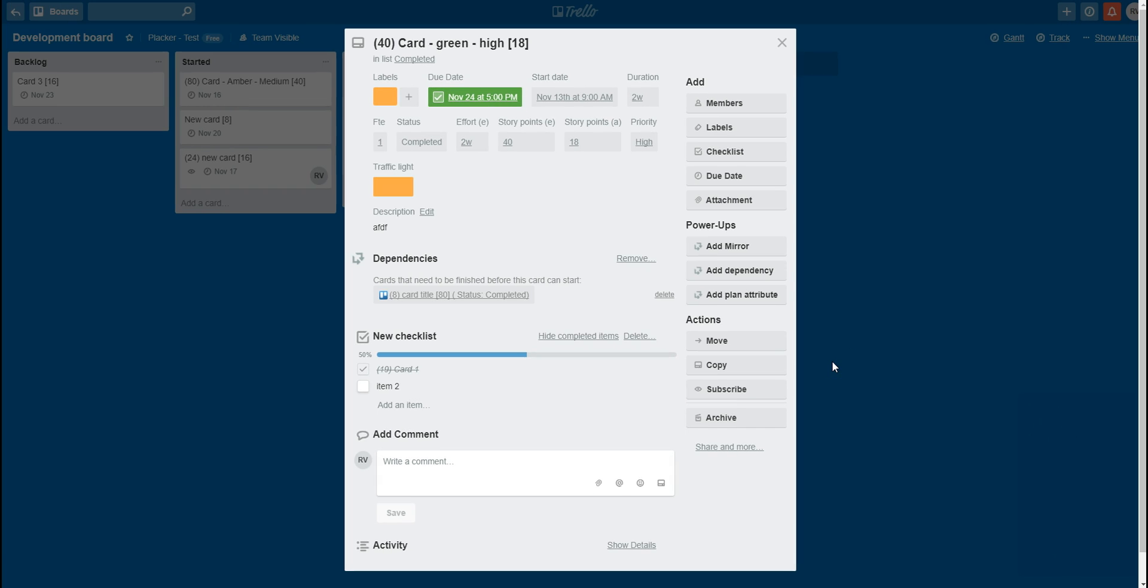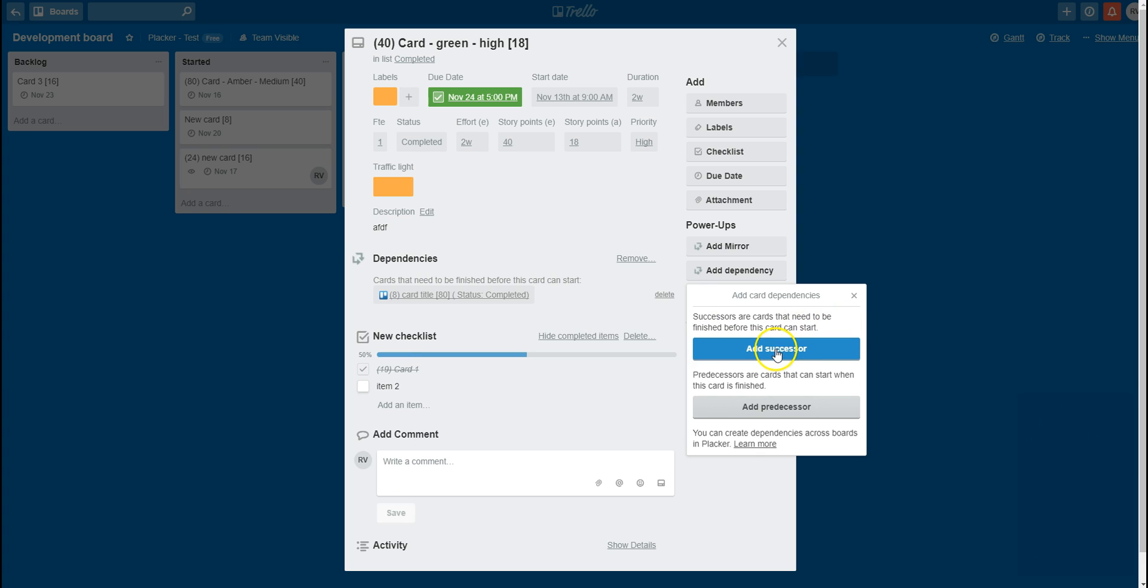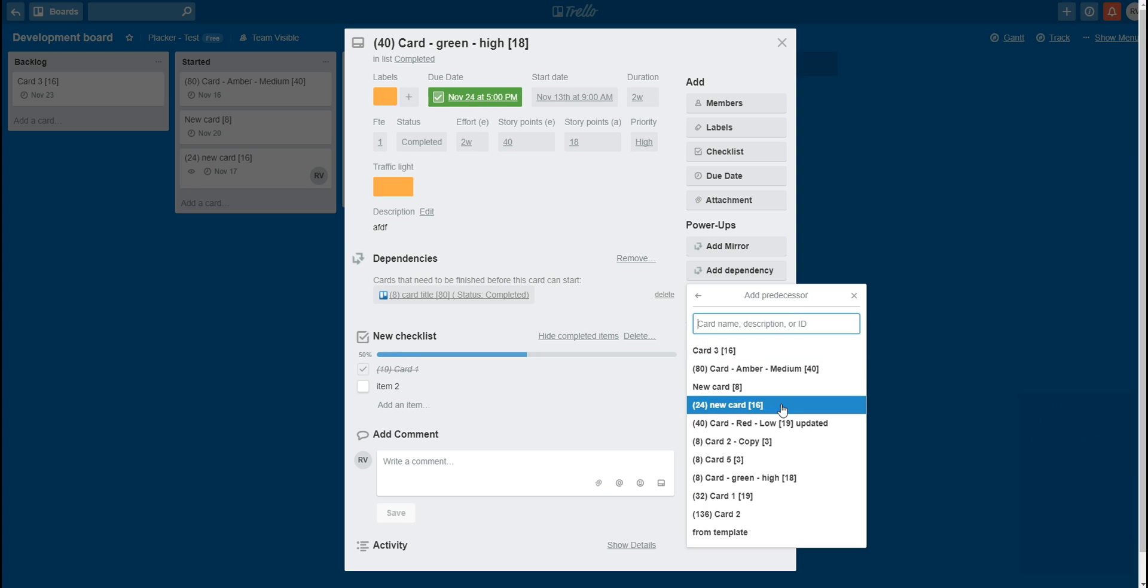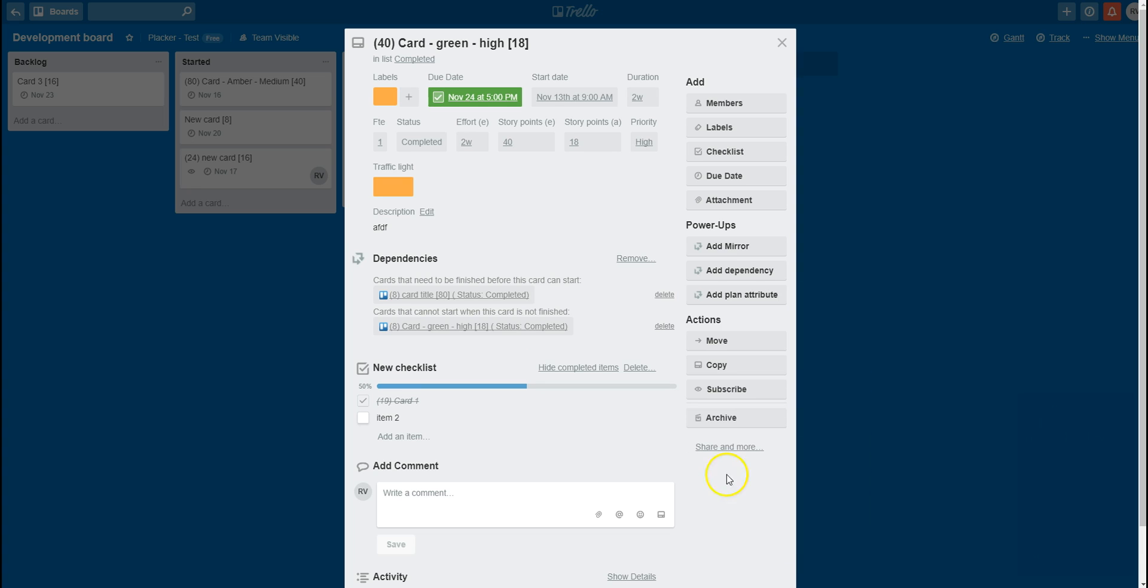I can add a new dependency by clicking on the button. I can either set cards that need to be finished before this card can start, which is a successor, or I can add dependencies for cards that can start when this card is finished. Clicking on the link allows me to select a card.